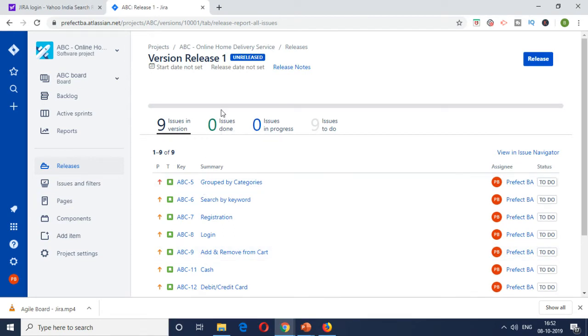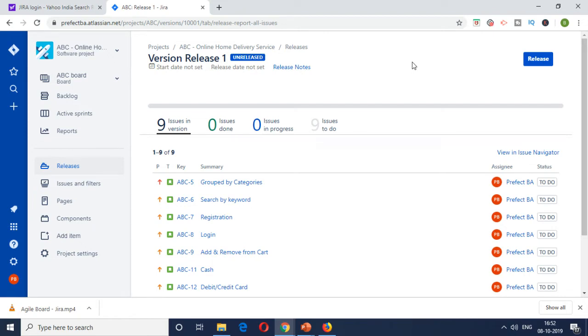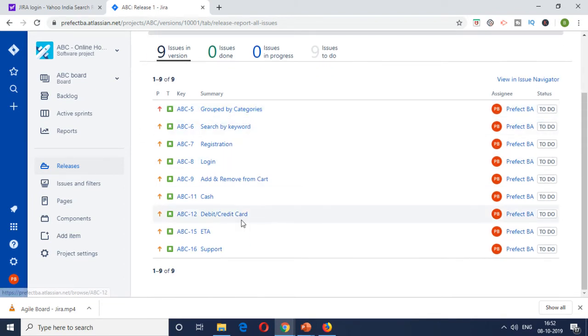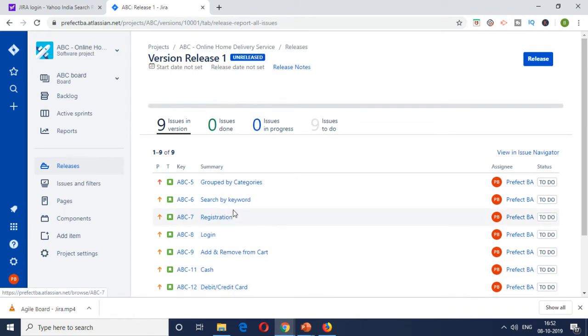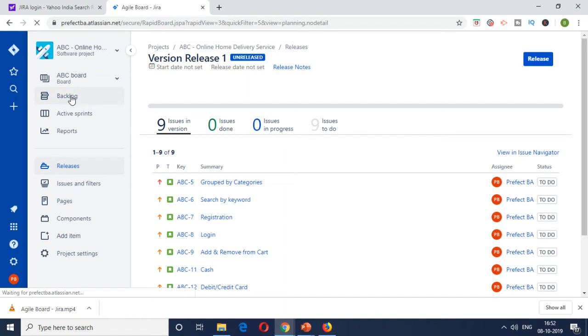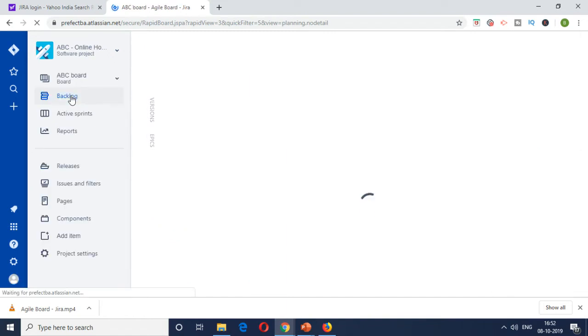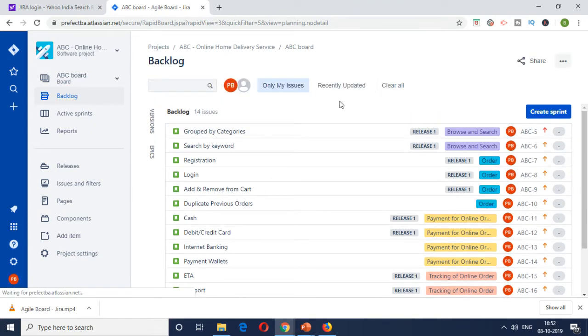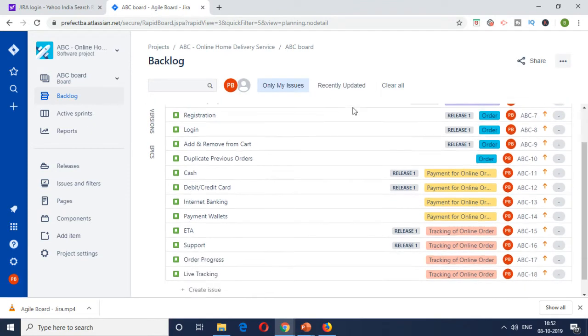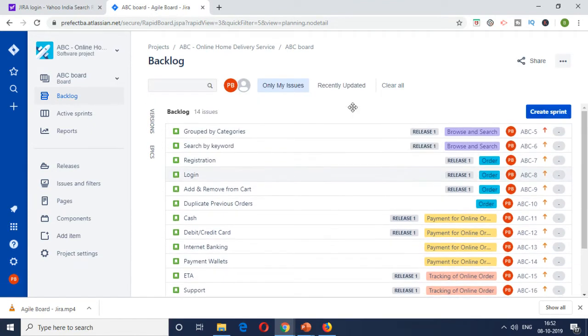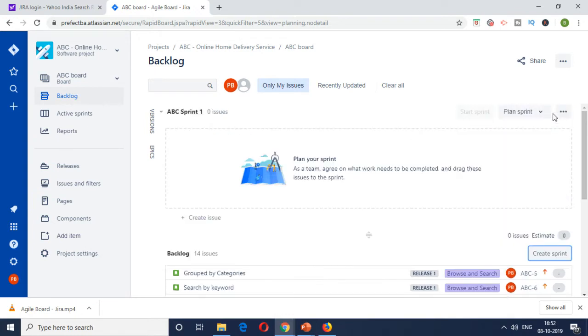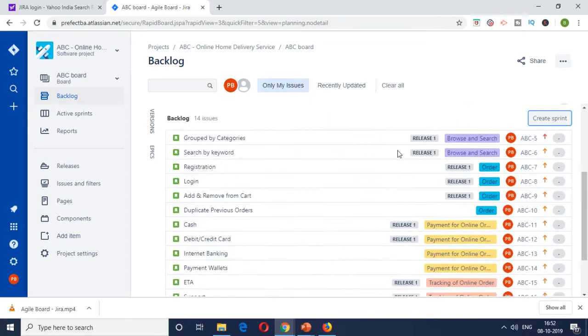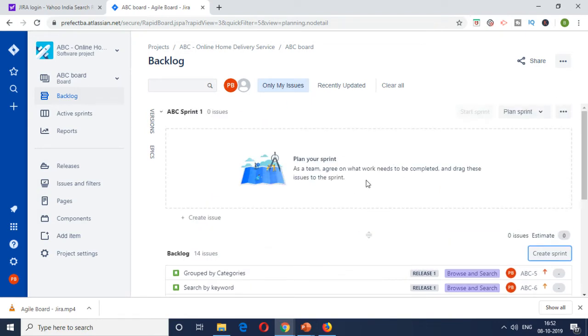But in order for us to develop this, we won't be able to complete all of these in a single sprint. So there would be multiple sprints required to deliver these items. So in order to do that, you have to create or you need to create a sprint backlog and then start running the sprints. So that is the second part of the video, which is sprint backlog. So what we're going to do is we're going to click on the button called create sprint. It'll create you this particular space. So basically this is your product backlog, and this is your sprint backlog.